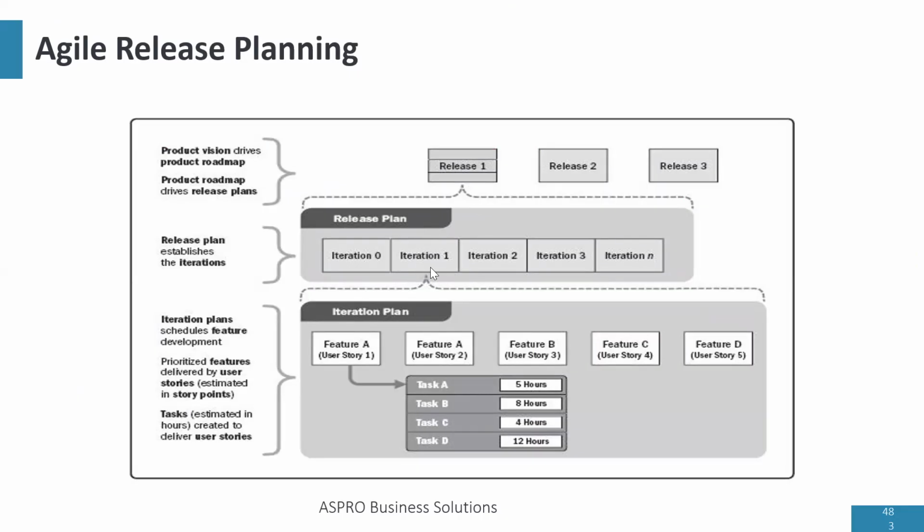So when we're doing sprint planning, we select the features, feature A to D, but in sprint planning we also determine the number of story points. Now this is where they got user story points. So feature A, after playing planning poker, we can say is 5 story points.